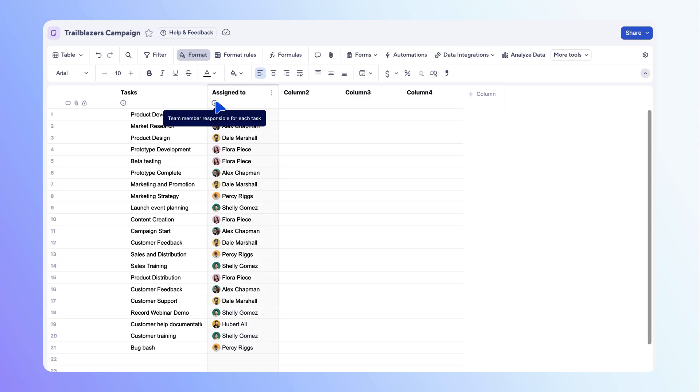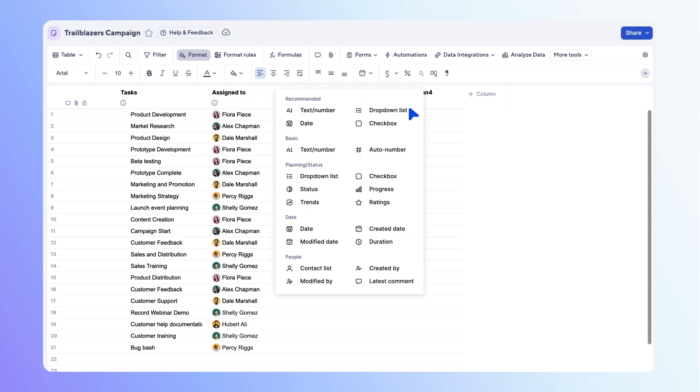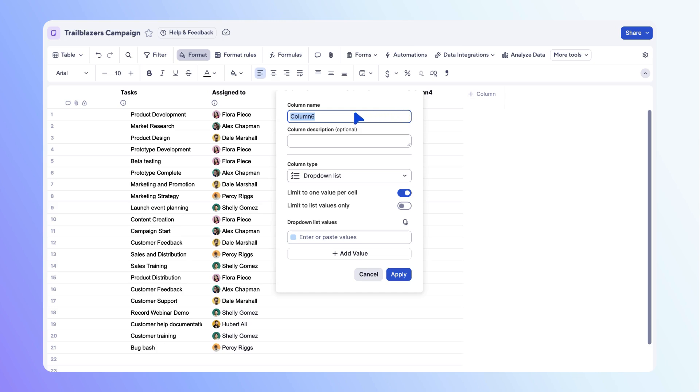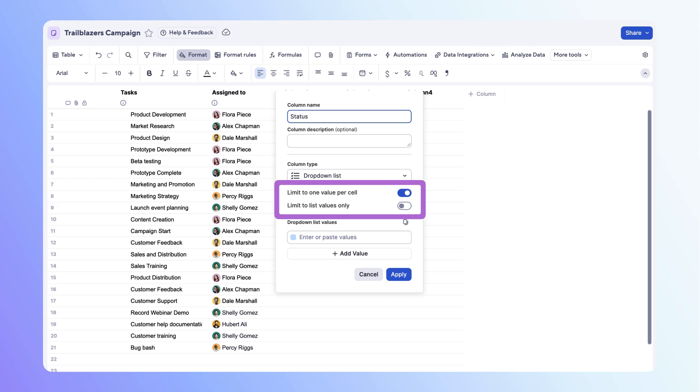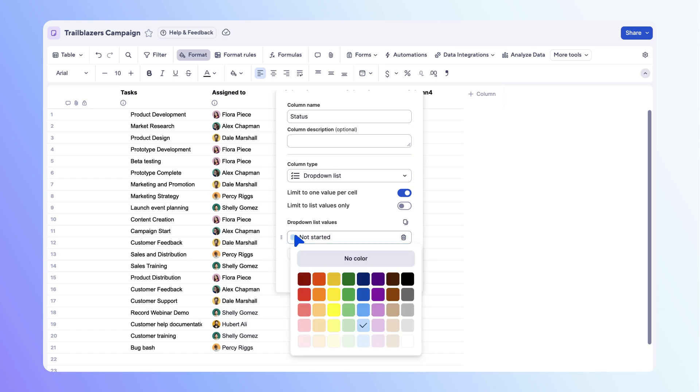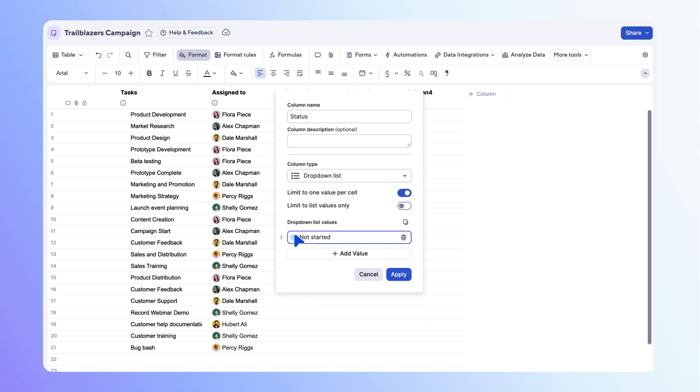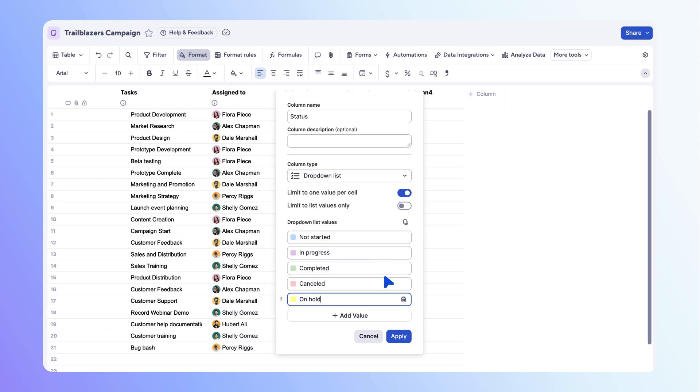Hover over the info icon to see the column description. Next, let's add a status column to track the progress of each task. Name the column status. Dropdown columns can be single or multi-select with optional value restrictions. Let's leave the settings as is and add status options. First, let's add not started. Use the color box on the row to change or remove the color value. Add the rest of the status values, then select apply.